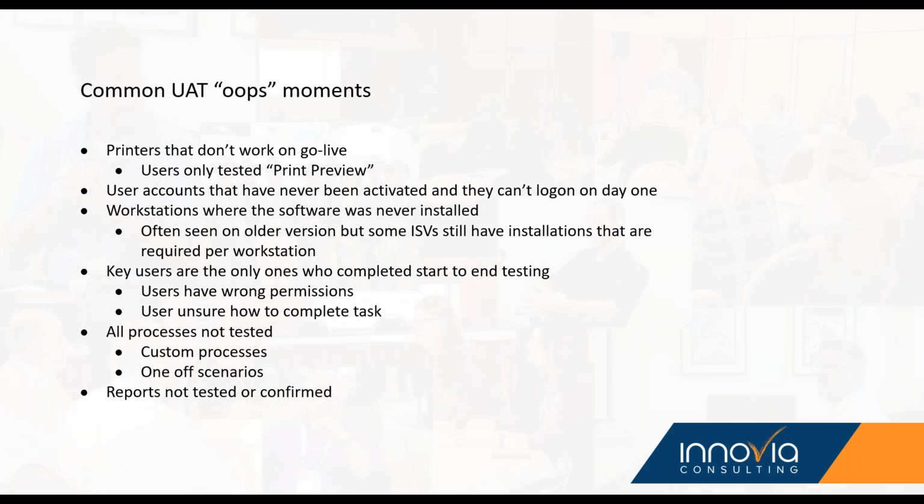Did I give it to my quote super user who's testing? Have they confirmed? Have that spreadsheet as they're walking through their day-to-day activities, and they can go, yep, I do those, and those. Oh, and then they go, oh, you know what, that one-off, let me go add that to the worksheet.